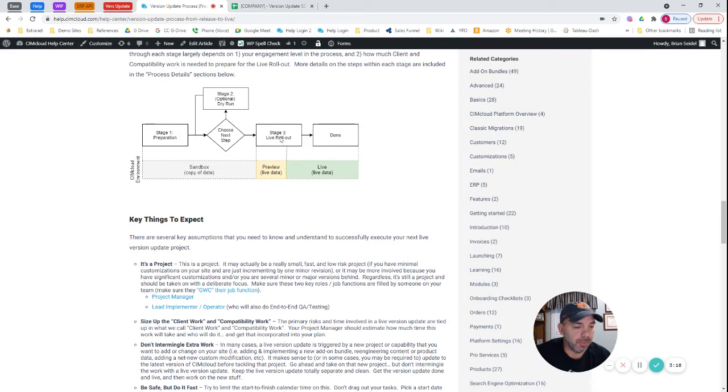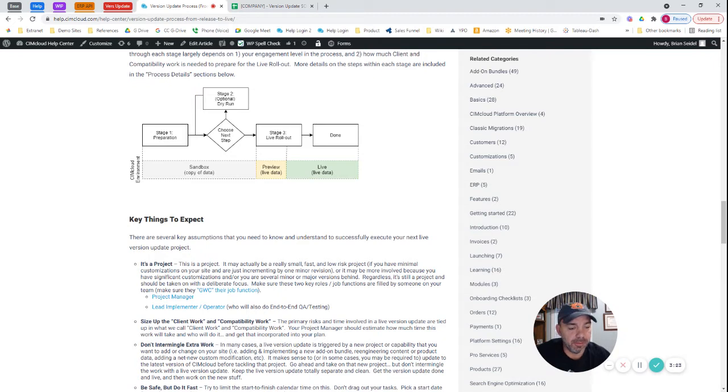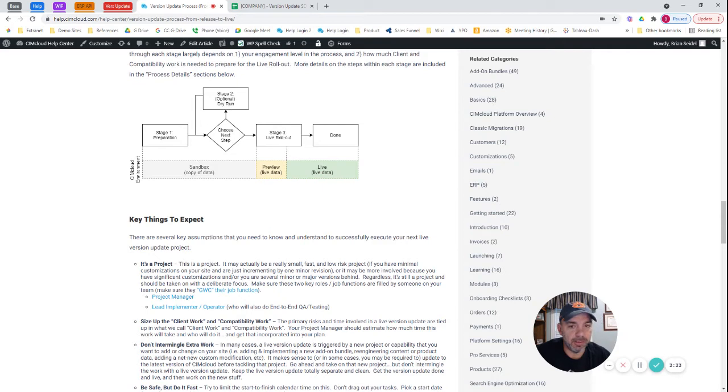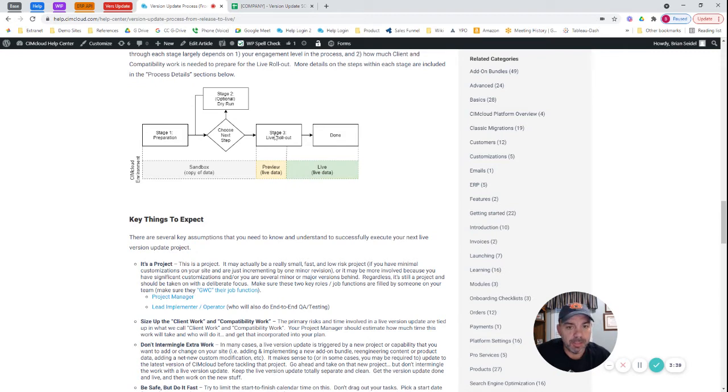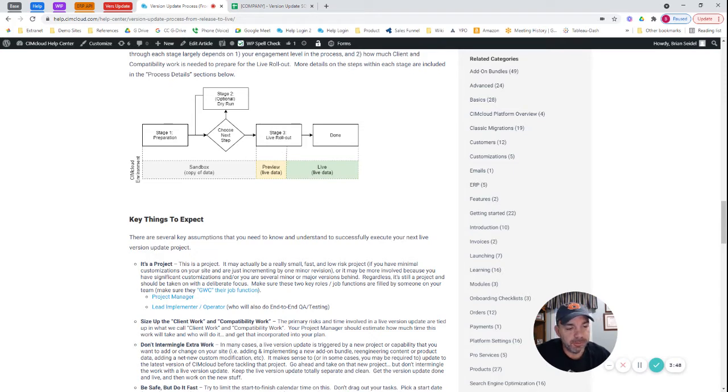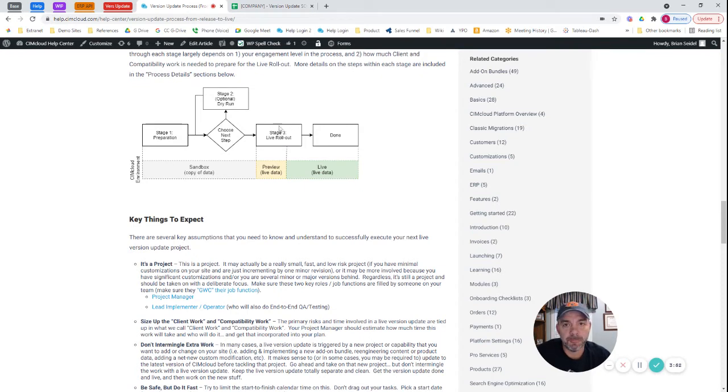And then ultimately, in stage three, that's when you're doing the actual go-live process. You're going to use that go-live checklist and your testing checklists as well. So the testing checklists are used in preparation to make sure everything's working properly, in the dry run to again validate everything's working properly, and in stage three after the publish to make sure everything's working properly and you haven't introduced breaking changes. The goal is to find things beforehand in preparation, or if there's any introduced during the live publish, to find them quickly to minimize the negative business impact.